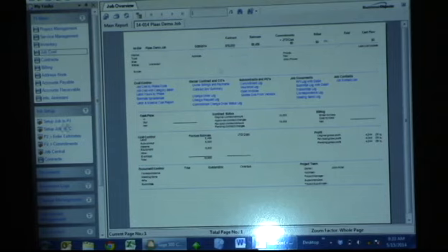And since we were just talking about changing estimates, an important thing to know, if you don't already, is anything you enter in the enter estimate grid is additive. So if you enter 1500 and say, oh wait, it was supposed to be 1300, if you go back in and enter 1300, now it's 2800 because it added those two numbers. So you would need to enter minus 200 because that's the delta.